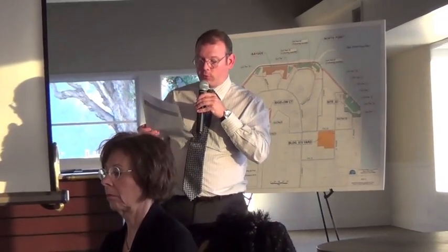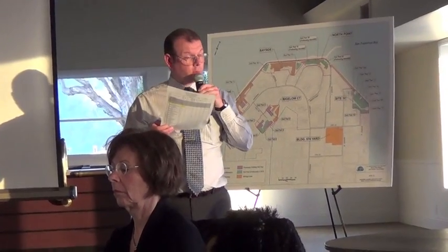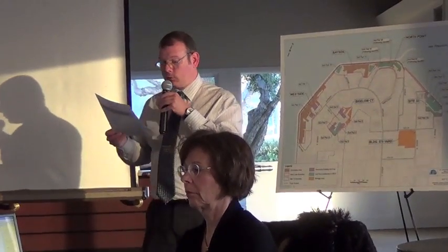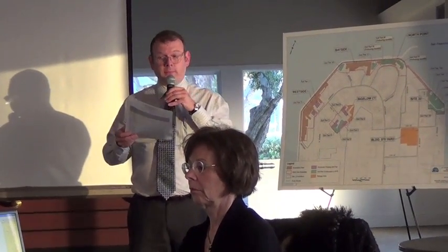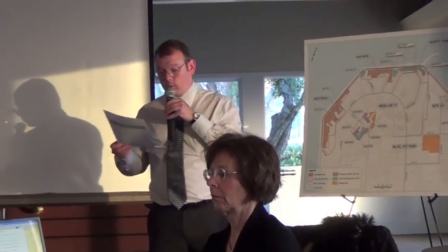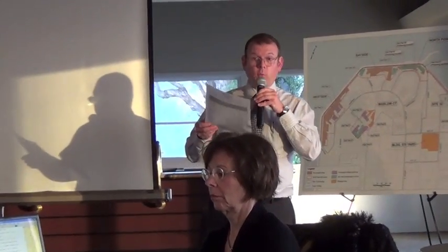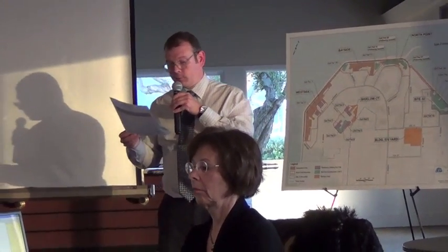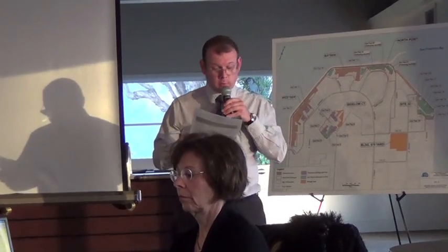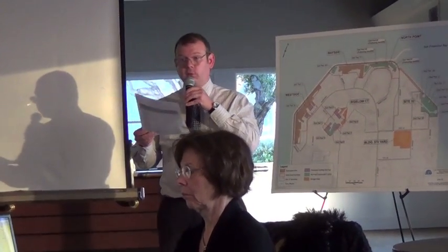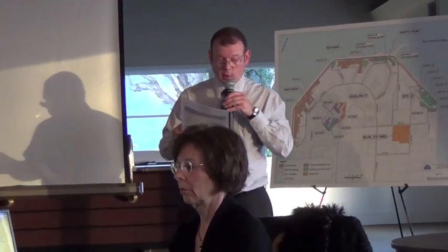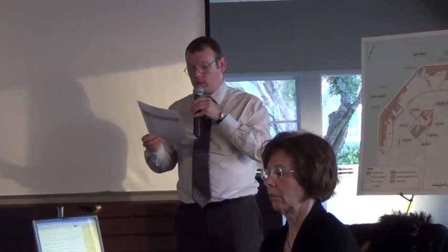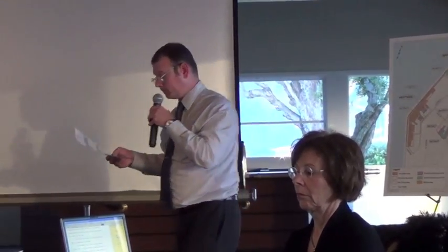The last 4 reports are sort of base-wide reports. Groundwater monitoring will have an annual report. Item number 23 is a land use control inspection report. For any site that has land use controls, we are required to do annual inspections, and we have 1 report to summarize the inspections. And then last but not least is our annual site management plan, which summarizes the complete environmental restoration program for Treasure Island. That will be going draft for everyone to review in July of this year.